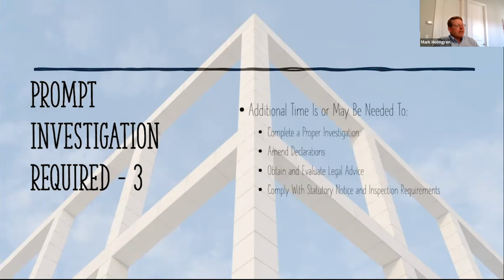One thing that goes with this is an asterisk. You have the time limits now, 2, 6, or 8 years. With litigation, it's easy. You're in a car accident, you have 2 years to bring your negligence claim. Because negligence is a tort. As we just said, you have a 2-year limitations period. So you're in a car crash, you got 2 years. With a construction defect claim, it's not necessarily that easy. Normally, you find the leaky roof, you got 6 years or until the building's 8 years old before you run out and file a lawsuit and you're timely.